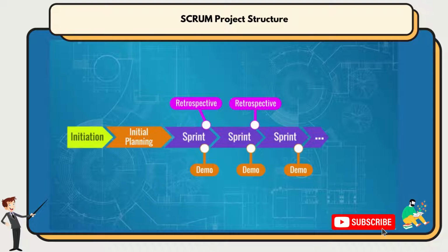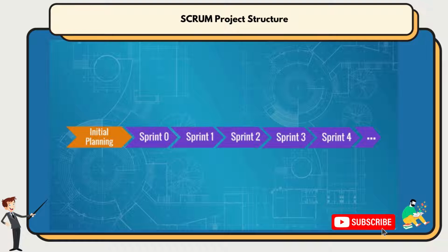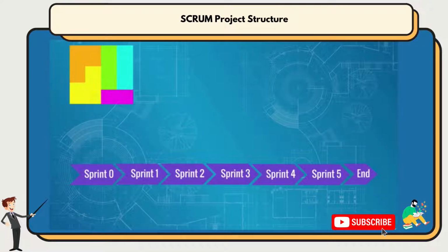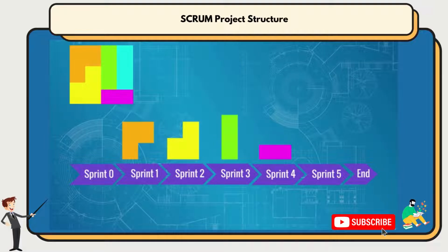The knowledge that the team has at the end of it has to cover what the scope or product will be. Before the sprints can start, the scope has to be allocated to the different sprints. This exercise is usually performed between the initial planning and the first sprint and is called Sprint 0. A plan is created, indicating how many tasks per sprint the team is targeting to achieve, which parts of the product to create first, which ones second, etc.